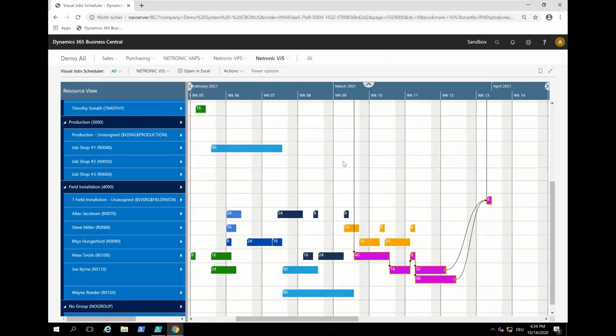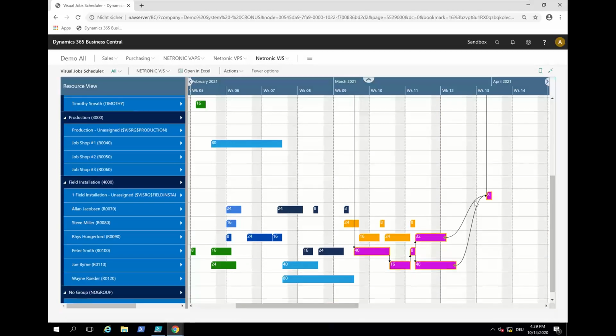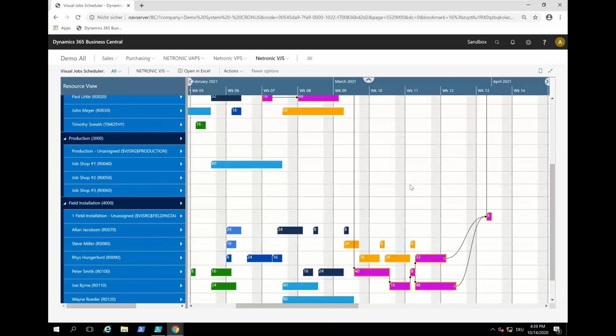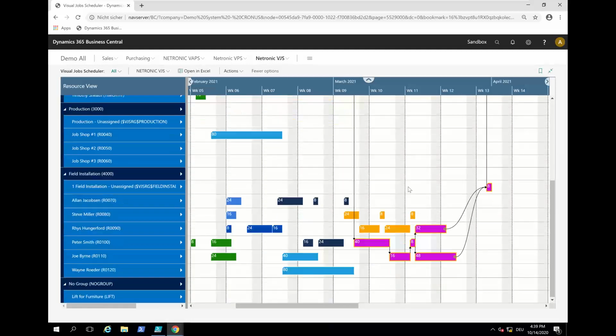And then you see I get a second bar, and the good thing is it knows the links, it knows the dependency, and now I can just assign this, for example, here to Reese, and we have all this link structure. So if this moves, then this will move, and if this moves, this will move as well. So when we split the job planning lines, we really also copy the links so that once you have defined them, you can really work with them.